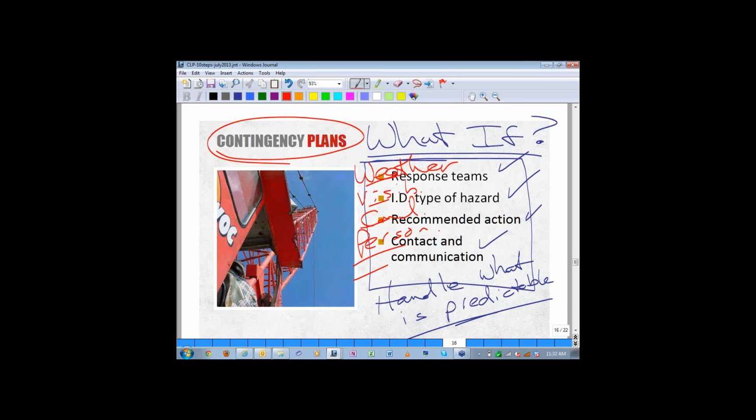Take San Francisco and some of those areas that get fog all the time, and numerous pictures have been around on the internet where you see a tower crane well up above the cloud line and fog line, and he cannot see anything below him. But they still have to get work done. So they just work on contingency plans. They work on radios, and the operator potentially has a rope footage counter inside the crane with him, so that he can tell how far the block is coming down, and he's got an estimation. He's at 250 feet, and he knows he'll start to slow down, also with radio communications on a continuous basis.